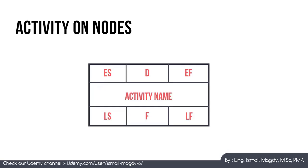Now we will learn the Activities on Nodes method. In this method, activities are shown as nodes containing specific data fields. The activity name is in the center. In the top-left corner is ES (Early Start), the earliest possible time for the activity to start. Next is D (Duration), the estimated duration of the activity.